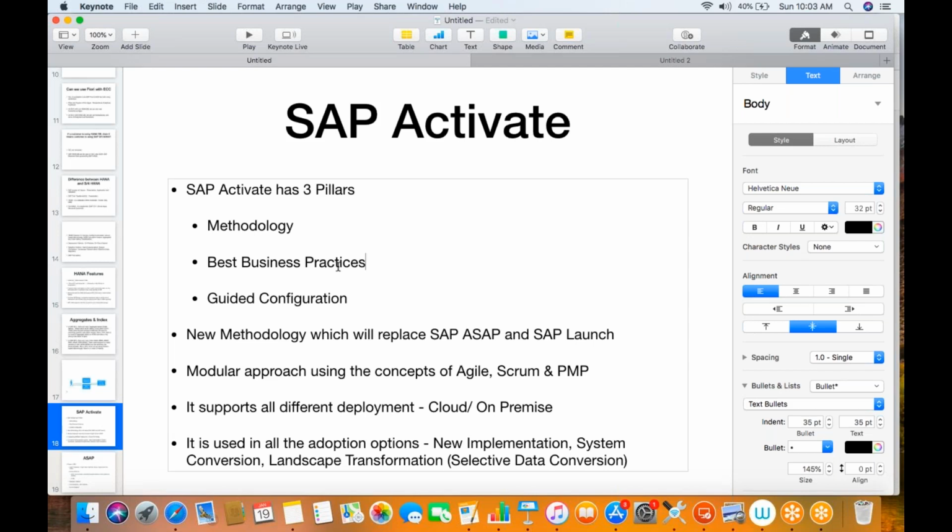Okay, okay. But I was just thinking, you don't need to wait till 100% is completed. See, normally what we do in the normal implementation approach is we get all the requirements and we take 1 year, 1.5 years of time because we want to develop all the things and we want to do the big bang go live, right? In one go. In this case, SAP is recommending don't do that, because unnecessarily you will not be able to realize whatever things are fitting your requirements for the next 1 year. At least whatever things are fit, go ahead with that and then slowly keep on upgrading your system.